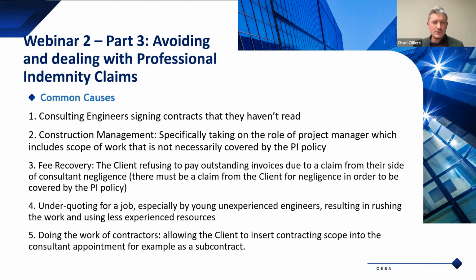Number four, underquoting for a job, especially by young, inexperienced engineers. This could result in the same thing as signing a contract you haven't read. You now have to rush the work to meet the deadlines. You may have to use less experienced resources because you know you don't have the competence to do the work. And it's only going to lead to massive problems.